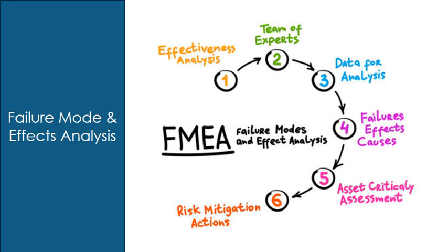Failure mode and effects analysis, or FMEA, is a step-by-step risk management method created by the U.S. military in the 1940s to find, rank, and prevent potential flaws or errors in a product, design, manufacturing process, or service before they cause harm or failure. It is best for high-stakes situations involving safety, regulatory compliance, or critical systems that require formal documentation.